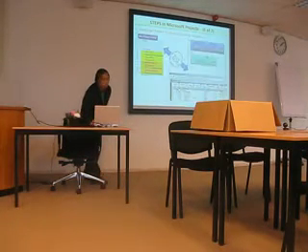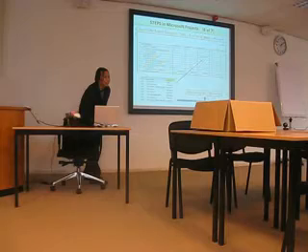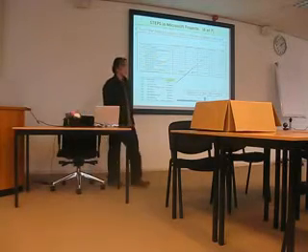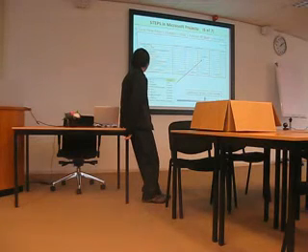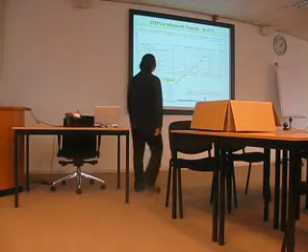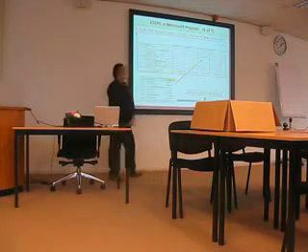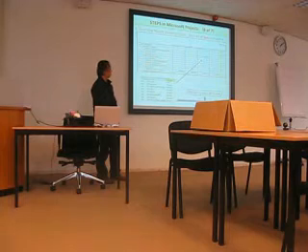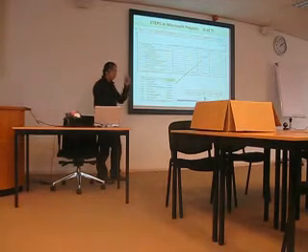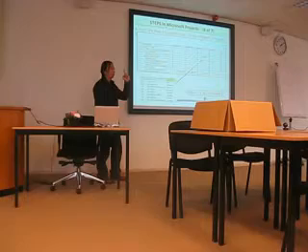I like the example you give, but in fact the transportation is something that you have to do on a boat. You don't pay the boat 200 euros every day. Yeah, this is prorated. So you would want that one to be at the start. Yeah. That's why we assume it's prorated, but actually we pay one time, not like this.